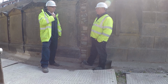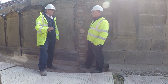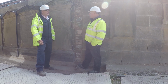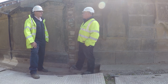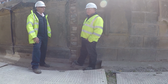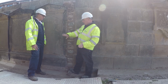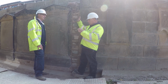So Billy, welcome to the project. Good morning. You've obviously been working off site, sorting the stones and looking at the gravestones prior to coming on site. You've been on site for about 6 weeks since late June? Yeah, this is our 7th week on site, and it's been really interesting sticking all the gravestones back together, figuring out how they all went together up at the yard, bringing them down on pallets in sequence, laying the base stones in first, making sure that all the bases were in the right position, not just visually but also to allow the stones to build back onto the top walls when we finally get up that high to do it.